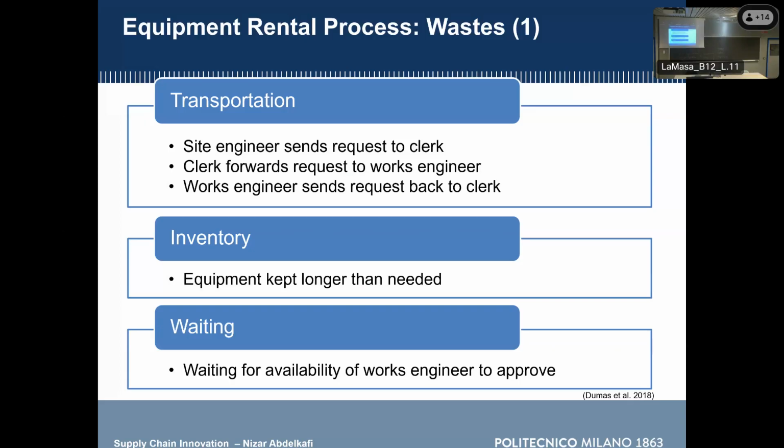Okay, so for the transportation, the handovers, I don't deal with them because this is very clear. Now, inventory. Inventory emerges in this process when equipment is kept longer than needed. Imagine that the site engineer just extends the period of using the equipment, but actually he or she doesn't use it effectively or does not use it at all. So that you are accumulating inventory,